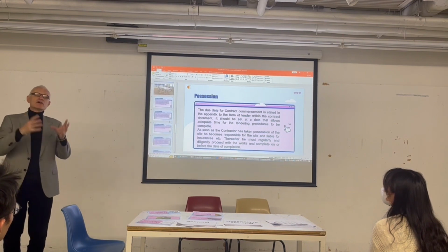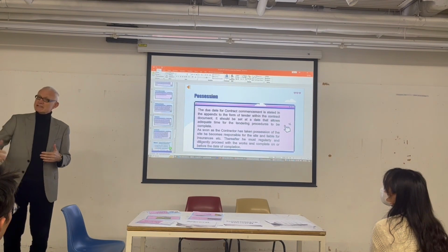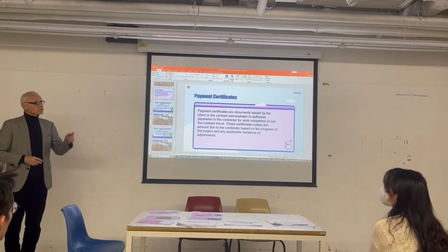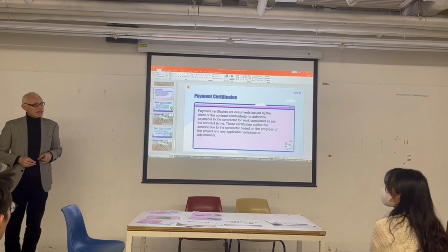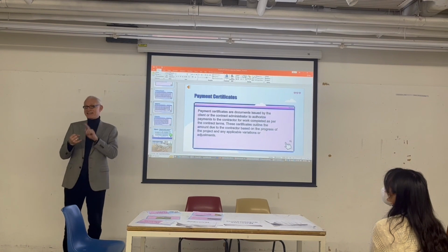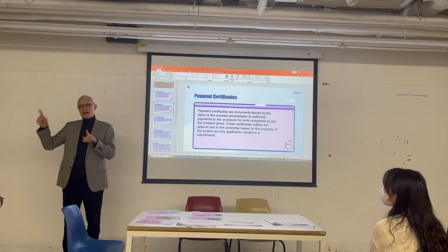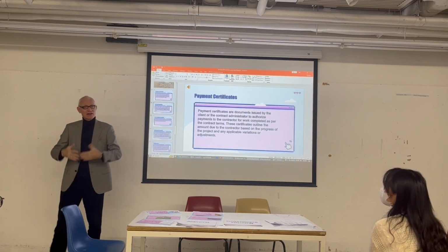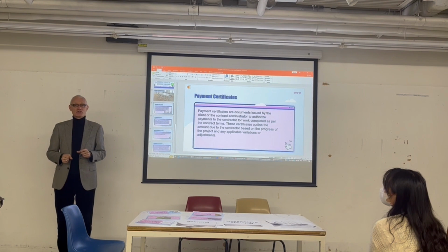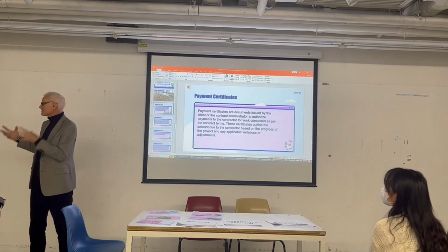So, if the contractor doesn't perform and meet the deadline, so you can move into her house as a tenant, you want some compensation for that delay. Right? So what we do is the contractor will be charged penalties every day they don't hand over on time. So this idea of time and cost. There's two things. One, sometimes we're giving them extra days, extension of time.